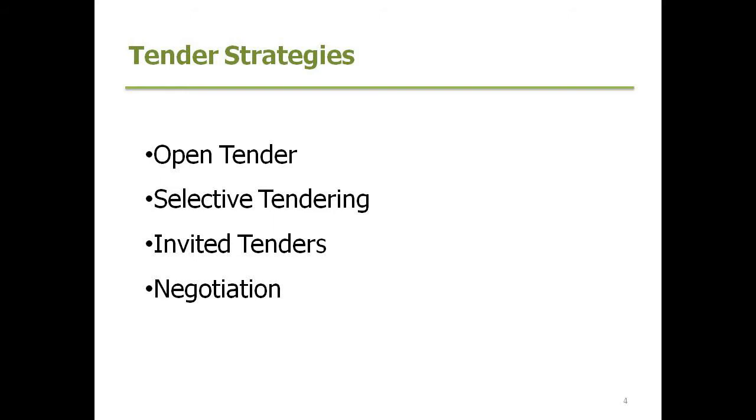So negotiation at one end, there is some advantages there with regards to getting the project up and running, and also having some real good comfort in knowing what that builder is all about. Having said that, we've lost a bit of the competitive edge though, possibly when it comes to pricing variations and looking ahead with that project if you compare it directly with open tendering.